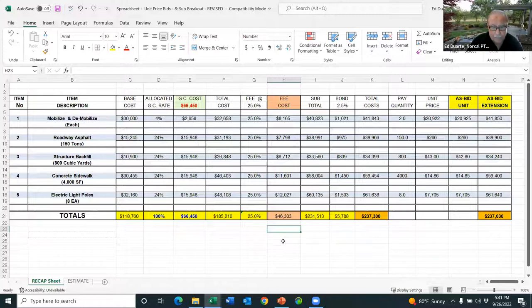Remember, in public works, per the California Public Contract Code, it is not about what a great company you are and what your certifications are. It's all about the money. You're either low or you're not. And if you're a prime, you are. There is no second place finish. You have to be low and comply with all provisions of the bid proposal requirements, but they're looking for the cheapest price. That's the way it's done in public works.